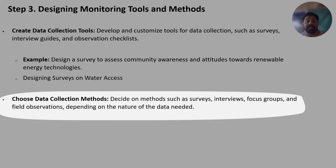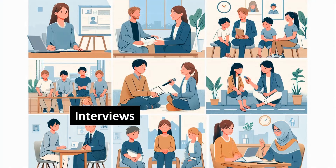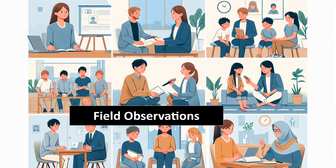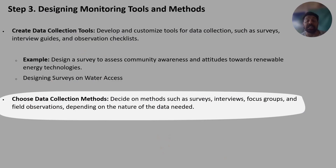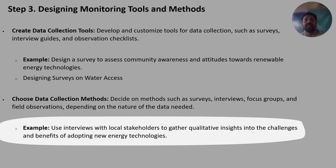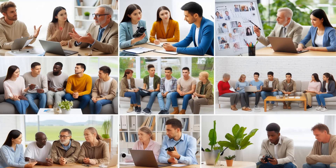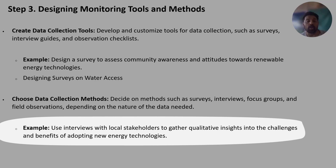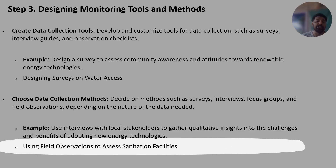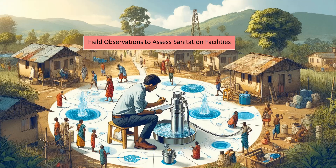After creating data collection tools, choose your data collection methods. Decide on methods such as surveys, interviews, focus groups, and field observation depending on the nature of data needed. For example, use interviews with local stakeholders to gather qualitative insights into the challenges and benefits of adopting new energy technologies.